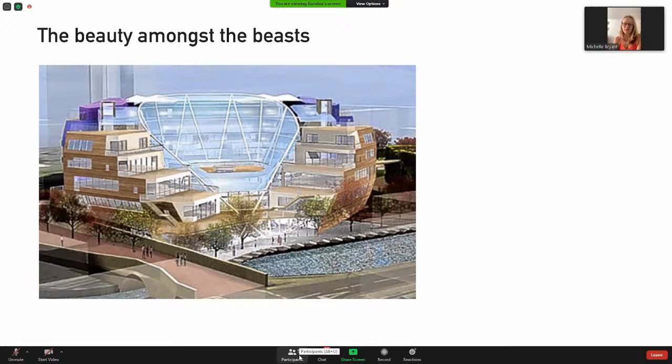Some of the disciplines on project management, and with some of the people, I've worked with some brilliant, really professional people and program managers, and very high level. A lot of my stakeholders have been MDs and above. But with some people, deadlines were optional. I've caught people moving milestones that were overdue, and they'd switch them to green and move them out, and there'd be no change control. So I'd have to put my foot down about that and just say, that's not acceptable.